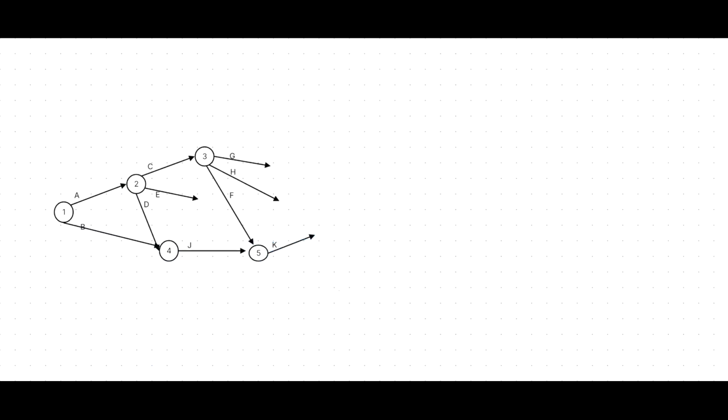Next, L, we need to complete E, H, G, K. E, H, G, K. Let's say E, H, G, K. The problem is we can't keep it inside because we would have to draw cross arrows. Then it's better to take the E outside of this. Okay, we start from the second event.